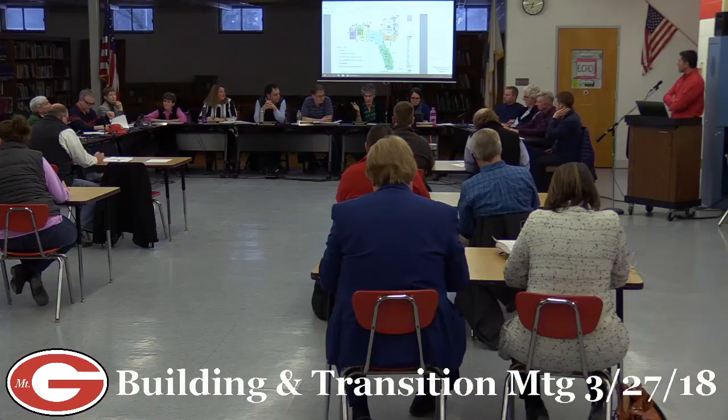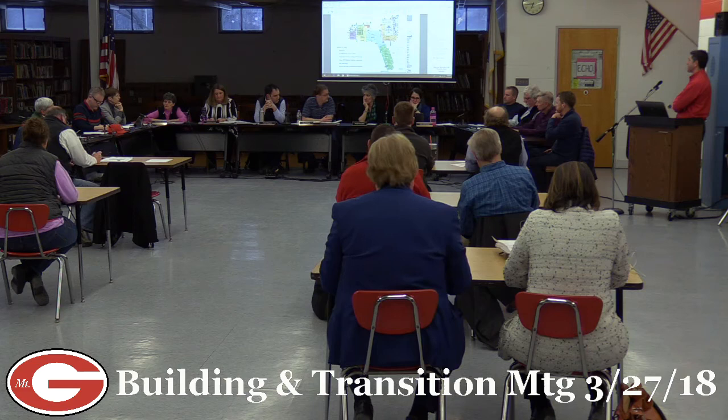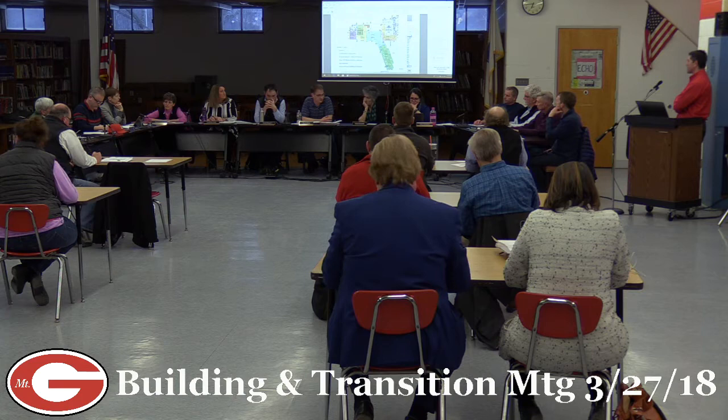But I know that there might be questions about that from others in the room, so I don't want to speak. What did we do with the earlier schedule? Do we have the earlier schedule in a contract? The earlier schedule's in the GMP, in the guaranteed maximum price amendment to the original contract. All right, and we would do a further amendment. We'd basically do a change order request or a change to the contract amendment, bringing this schedule in.